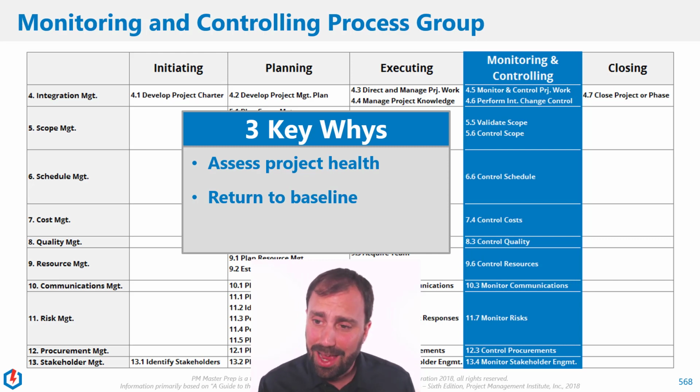That's where we said, hey, if we do what we need to do and we hit our process and our plan, we're going to hit our project based on a certain day, a certain cost, a certain scope output. We have to assess ourselves as we go through the project against that baseline. If we're off the baseline in a negative sense, then we're going to have to make some adjustments, right? And those come in the form of change requests.